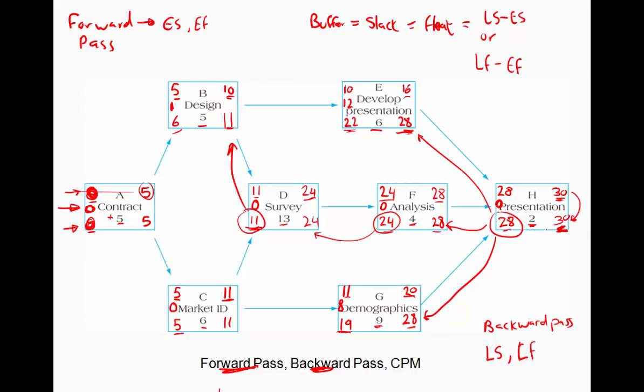Critical path means that it is the path in the network diagram which, if any of these activities are delayed on that path, will cause the delay of the entire project. Another way to describe that is, all the activities that have a float of time 0, on any path through to the end of the project will determine the critical path. Another way to describe that is any path in a network diagram that has activities that all have a float of zero represents the critical path.